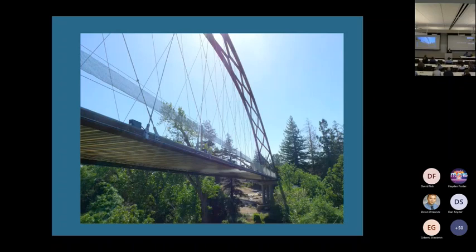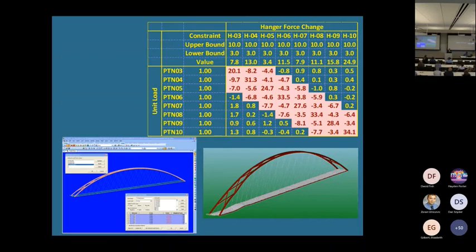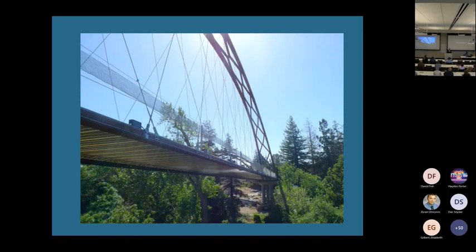It's really heartfelt. The other piece of this was pedestrian bridges, the railing is freaking expensive. So part of the logic here, because this project was so over budget, was could we get rid of the railing? So this is a bridge with no railing because all we did was stretch a mesh and attach it to the cables. So one of the reasons we had so many cables, which pissed Gregor off because there was so much complication to tuning the cables, was to avoid the railings. And I would do that again. It's complicated, but I would do that again.